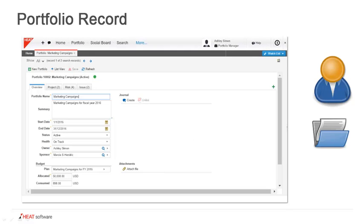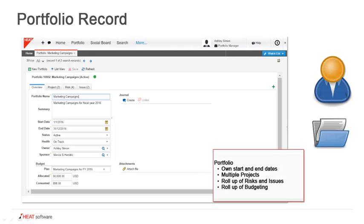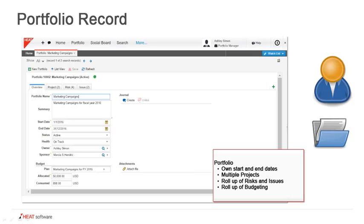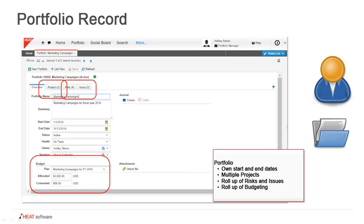If we take a look at the portfolio record itself, we can see that it has its own start and end date. A portfolio may be something that spans a year, whereas the individual projects may span shorter periods of time within that, and of course the projects can have overlap. Obviously there are multiple projects that can be tracked here. The reason you want to have portfolios is to have multiple projects rolled up into one spot, and the roll up is going to be of the risks, the issues, as well as the budgeting.